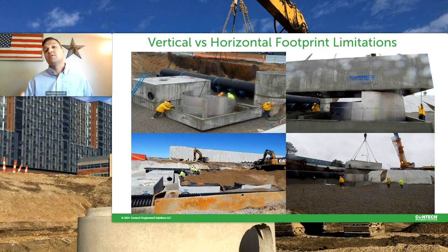And one of the main reasons for that was on the bottom right-hand side, you can see a crane setting that top portion of this precast. If they had that equipment on site, it made our lives a lot easier and made the decision a lot easier to say, they're not going to have to get a separate piece of equipment to do this. We're good to go.